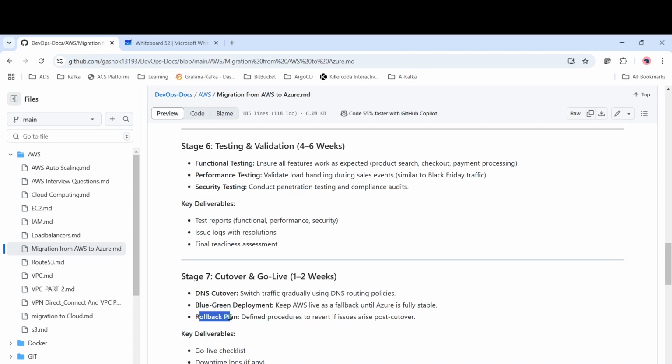There shouldn't be any disappointment in not going ahead with the migration, because if you migrate with faulty environments, then obviously it is going to cost you more. So falling back is far better than directly migrating. Always you should have a rollback plan. It will not be a single team: you will have the networking team, security team, database team, DevOps team, dev team, testing team, everyone involved. So if even one team goes wrong, we have to roll it back, because we can't take risk.